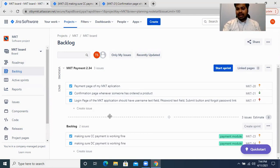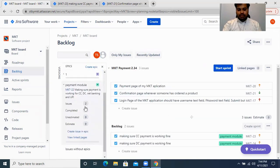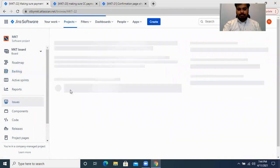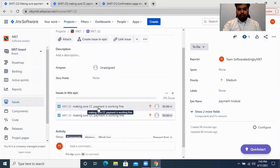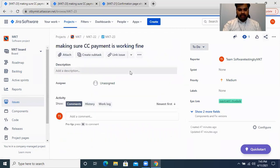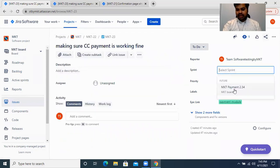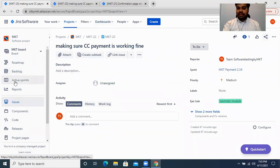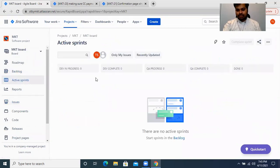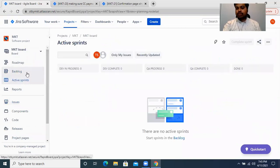This is how you deal with your product backlog and move items to your current sprint. One more thing — in the payment module, if you open any task from your epic, you can move it directly to any sprint. For example, you can move it to the current sprint, which is 2.34. The moment you go to your active sprint, you can see that task there. If the sprint is closed, the task won't appear until a new sprint is started.